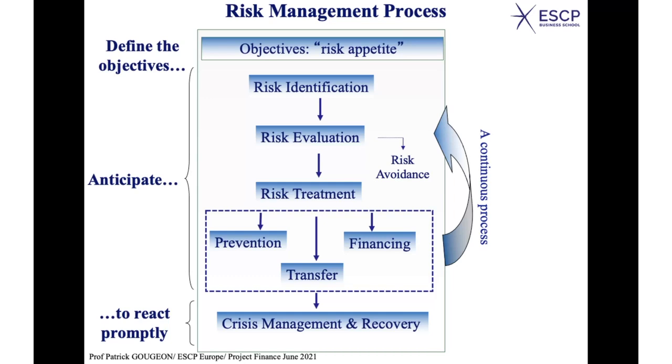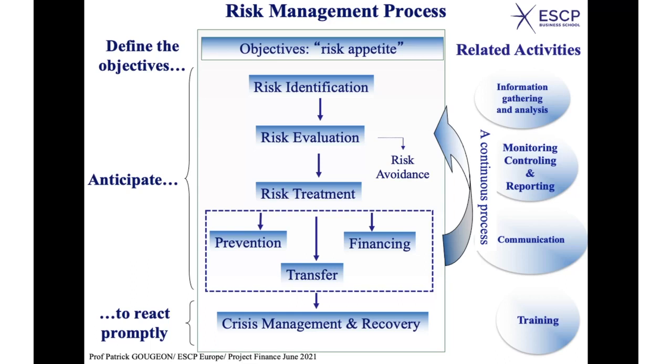Okay, and you have all types of related activities. You need to gather and analyze information to make sure that you are in line with your projections, making sure that the risk is not deteriorating, monitoring, controlling, and reporting to show the stakeholders that everything is in hand. You also have to communicate to the outside investors, and provide training if necessary for your people if there are some new technologies to be used or new ways to handle the risk. Okay, so here you have a full picture of what we are talking about when we talk about risk management.